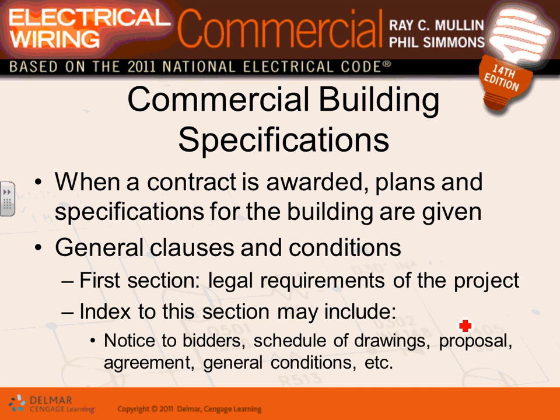Then specification. I always give you guys a set of spec. The set of spec has general clause and conditions. You put it with your plans. It accompanies your plans. Every time you have a set of plans, you have a set of specification with it. This becomes part of your building contract. When you sign a contract to build this building, that's part of your contract.